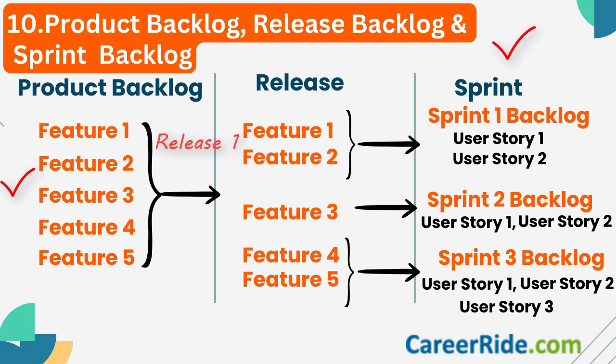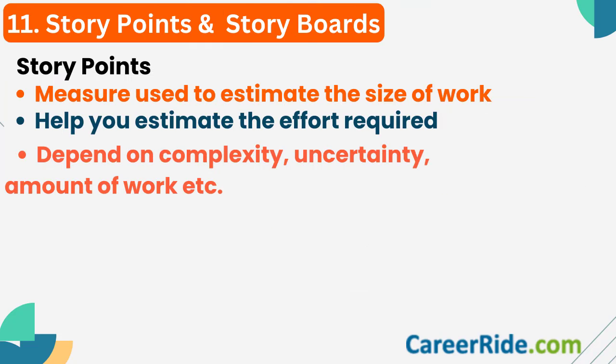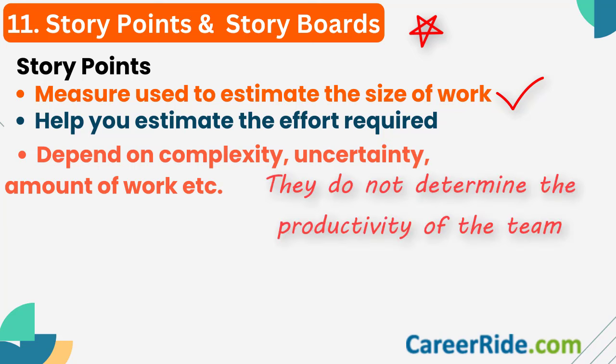Sprint backlog, as you can see in the diagram, are the user stories or a focused list of tasks you plan to complete during a specific sprint. Question number 11: what are story points and story boards in Scrum? Story points are numerical values used to estimate the size of work in a project and sprint. They do not determine the productivity of a team — they help in estimating the total effort required in implementing the product backlog, based on task complexity, amount of work, and uncertainties involved.